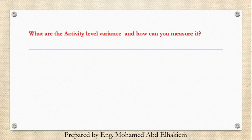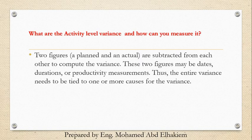What are the activity level variants and how can you measure them? Two figures — a planned and an actual — are subtracted from each other to compute the variance. These two figures may be dates, durations, or productivity measurements. Thus, the entire variance needs to be tied to one or more causes for the variance.